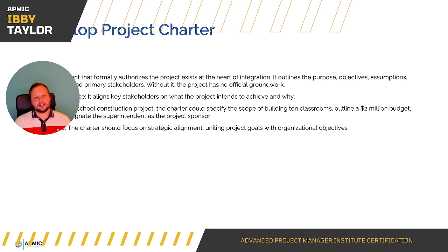So the significance is that it aligns key stakeholders on what the project intends to achieve and why. So for a school construction project, the charter could specify the scope of building 10 classrooms, outline a £2 million budget, or dollar budget, and designate the superintendent as the project sponsor. So note, the charter should focus on strategic alignment, uniting project goals with organisational objectives. So it's bringing together not only what the school wants, which is to build 10 classrooms, it's also bringing in the financial element and the budget.